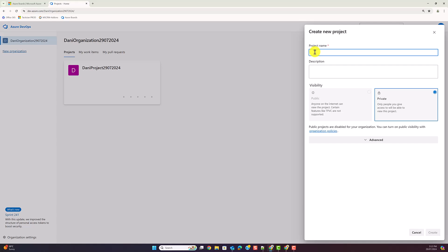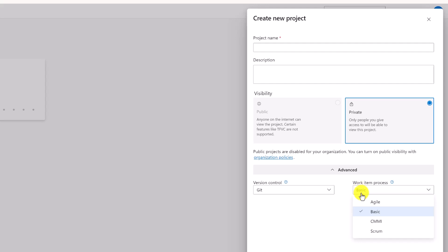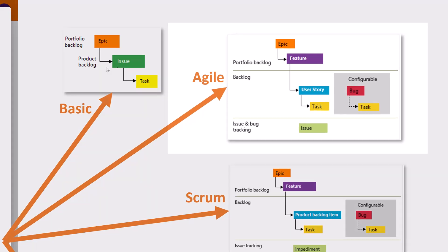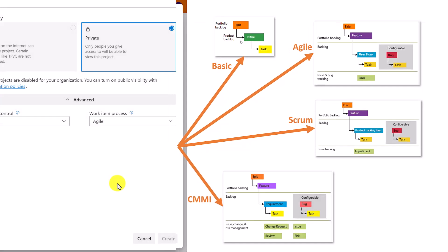By creating a second project you'll be able to select version control — that's not the scope of this video — but importantly you can select the Work Item Process. The 'Basic' process is what was used when you created your first project. I'm going to select a different process. There are four processes available, and I like to pick the Agile process. As you can see, the Agile process comes with epics, features, user stories, tasks, bugs, and so forth. Feel free to experiment with the others.